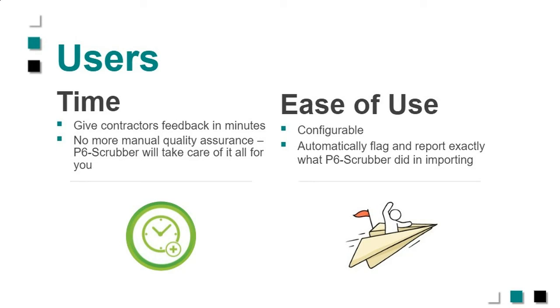The definitions are set by the scheduling team. They can run it in and very quickly give the contractor feedback because there are spec requirements that they have to marry up to. So that is saving them a lot of time and they're able to give the feedback very quickly. In this particular example, they are doing updates in some cases weekly, but definitely every 2 weeks and every month. And there are reporting gates at each of those to the program management group. So this is making that achievable. It's a big, big win for them.